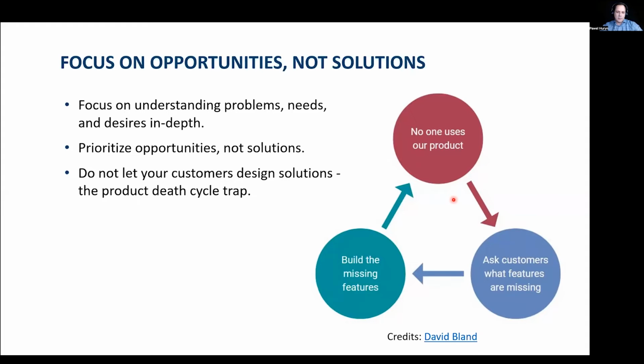But in that case, I would just ask why it is important and what are the success criteria to understand the reason for implementing this feature. And after understanding it, I would try to reframe or reverse engineer it so that we define the problem and the solution that the stakeholder proposed is only one of the possible solutions, but we agree with the stakeholder on the acceptance criteria.